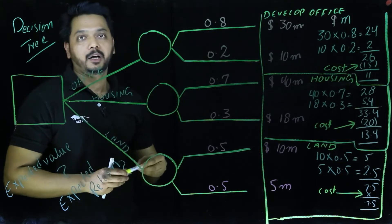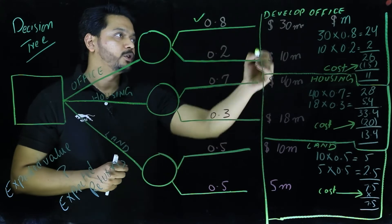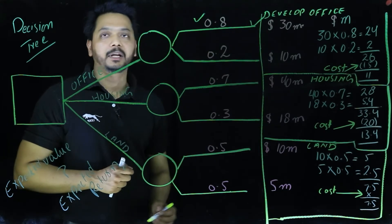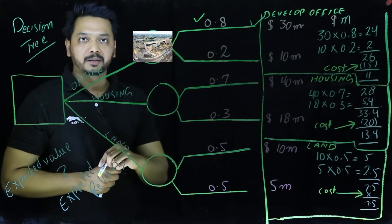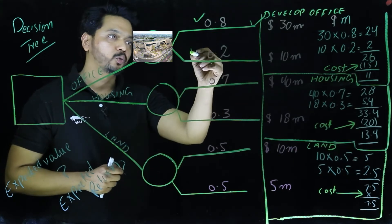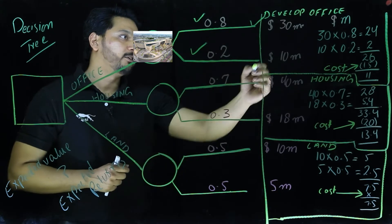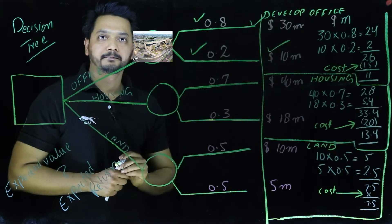This will give them $30 million. In comparison, if the expected probability of failure is 20% here, which will give them an expected return of $10 million.